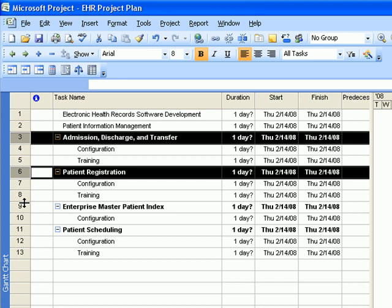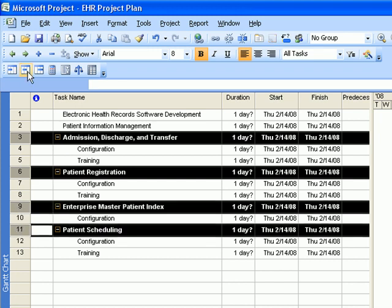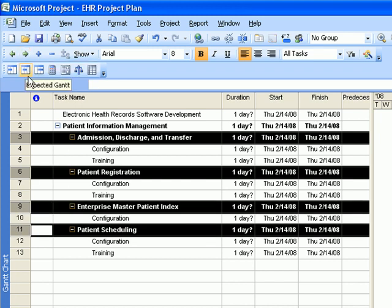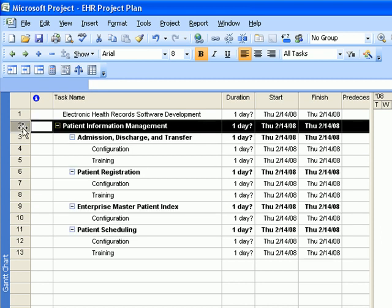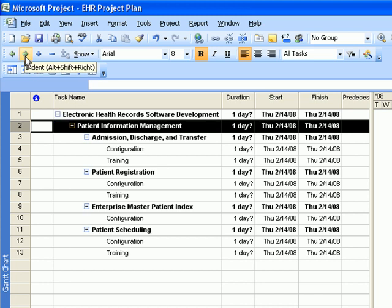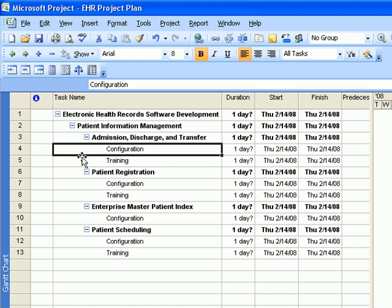Then hold down the Control key, click on the tasks, and indent them one more time. Next, highlight the summary task and click on Indent. Now we have a properly formatted and properly indented project management project plan.